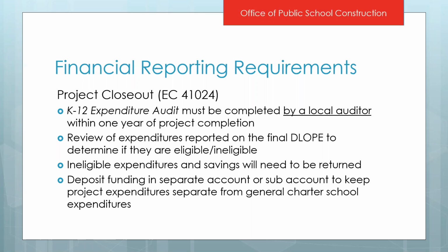You can request a pre-review from our office prior to submitting your 5006 with 100% reported, or prior to that 3 to 4 year deadline being hit, and we can review it to see if there is anything that stands out as being ineligible. But once you submit that 5006 that has 100% reported, or the 3 or 4 year timeline hits, that pre-review cannot be requested.